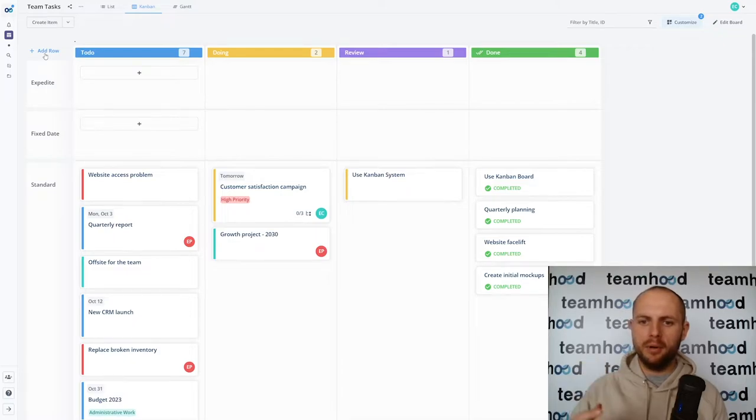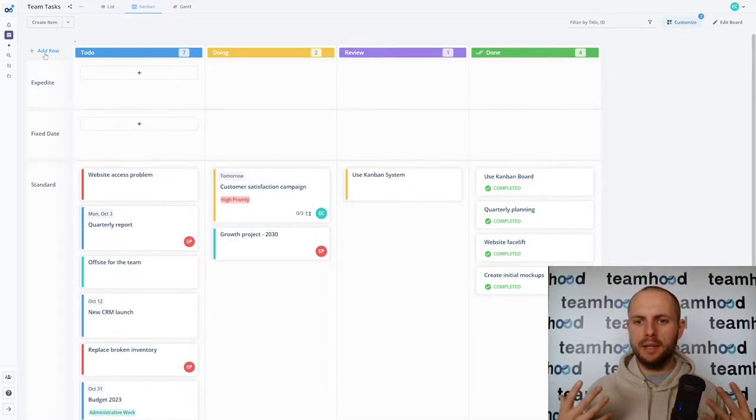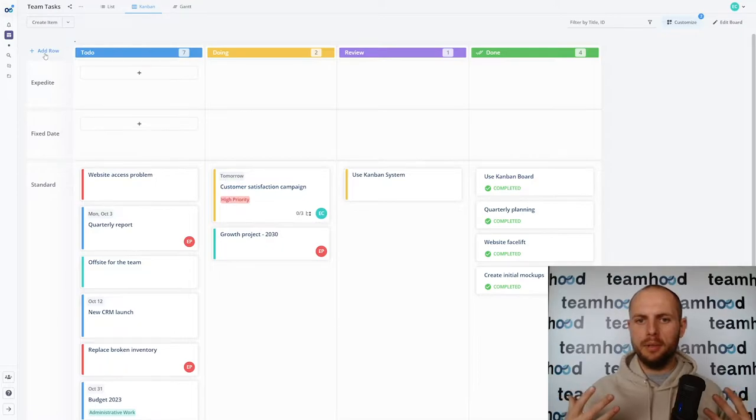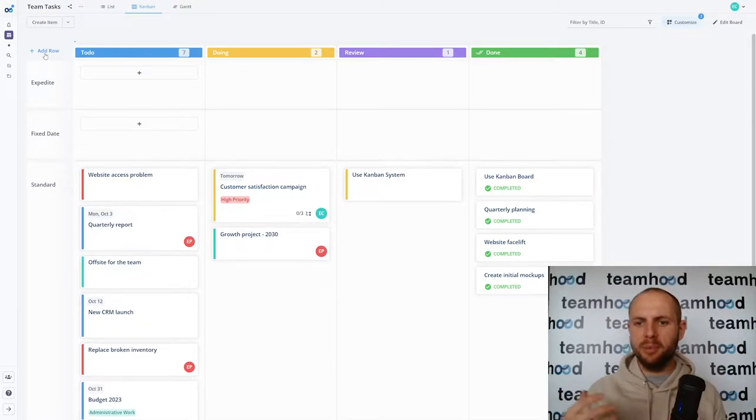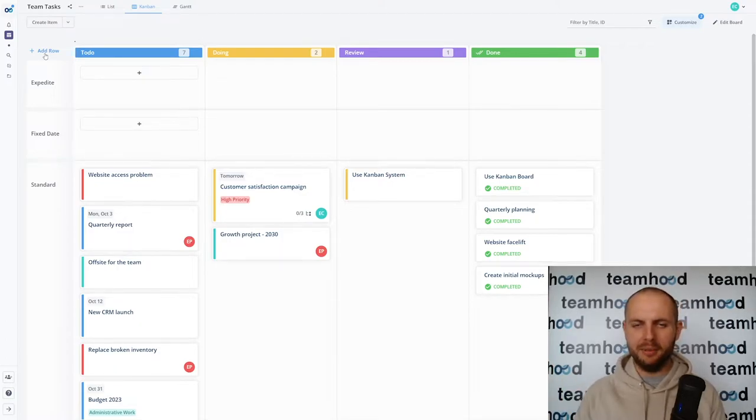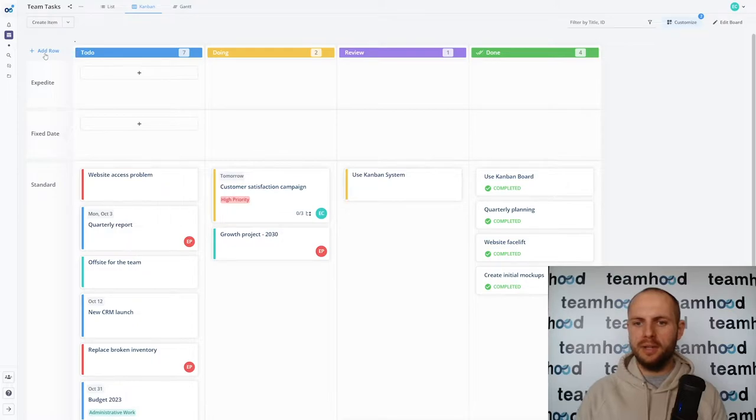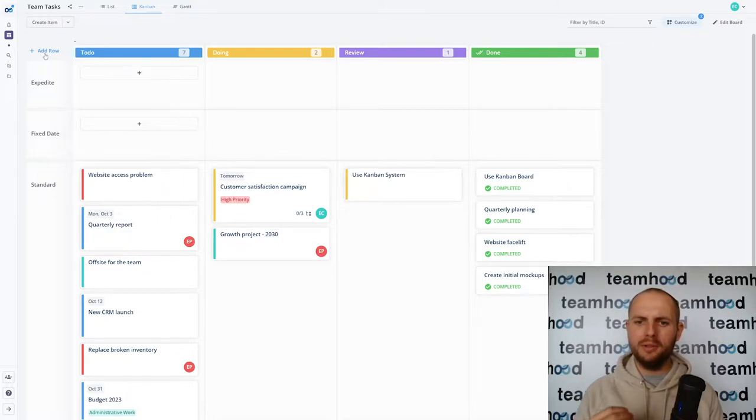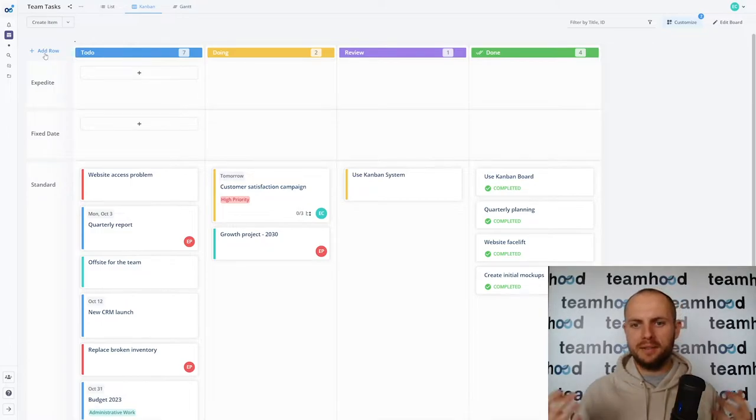And the last one is expedite. It's the most important one because the longer we don't do it, the faster and more value we will lose and it's really about significant loss of value. For instance if there is a very urgent issue that you need to solve for your customer, the longer you don't do it the more trust you will lose from customer and that's value loss.